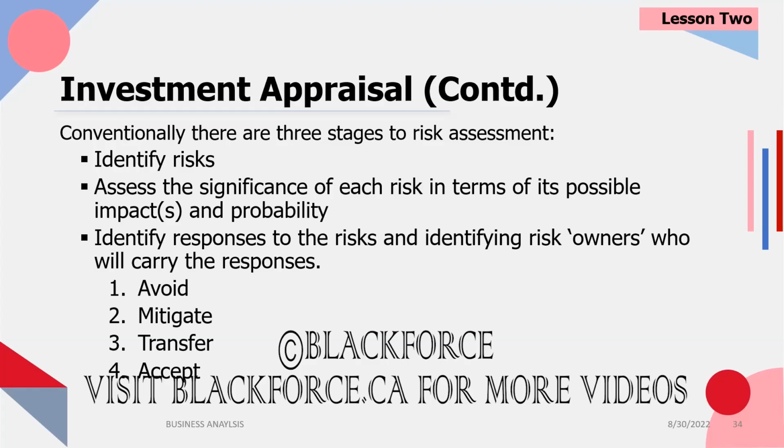An example would be you're giving a contract to a vendor, you're going to implement their tool. But you build a clause into that contract to say, if this risk looks like it's going to happen, we are canceling the contract, and you get them to sign it. Okay?